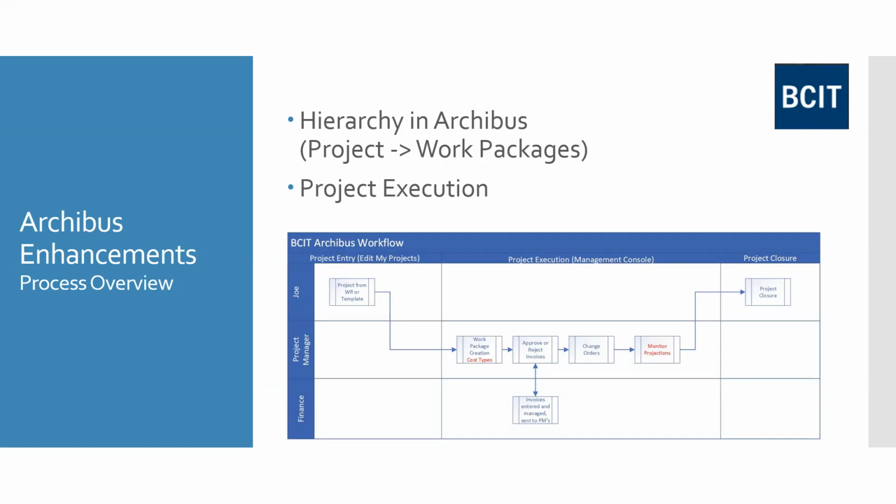If you look at a project from a contract plus invoices plus change orders, that would equal kind of the current state financially of your project. Again, there's a lot more financial intricacies that you guys work through as project managers and other disciplines, but from our perspective, that's kind of how we're looking at the world right now.